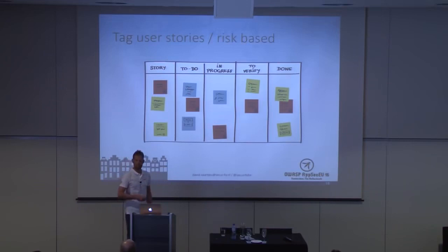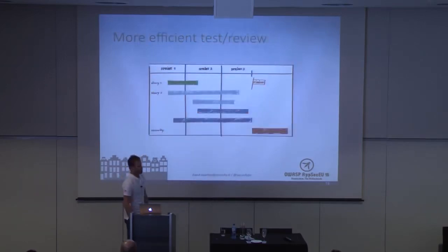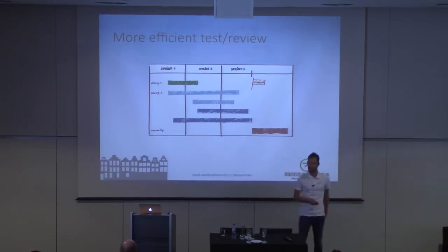This really sped up this entire pen testing thing, because remember, at the moment we were still doing this pen testing approach, but because I was joining this grooming, I could very well prepare for such a test. So I knew it was coming. I knew how many security relevant changes were in there. I knew which requirements we should check. So we were able to schedule upfront for a 5, 4, 3, 2, or 0-day pen test.